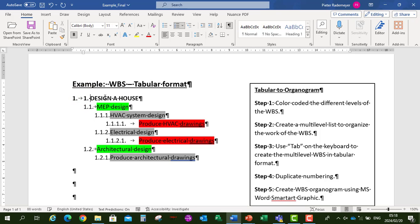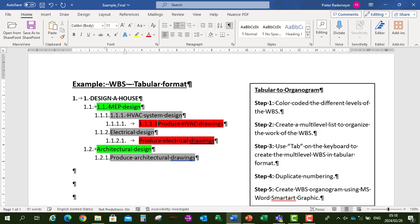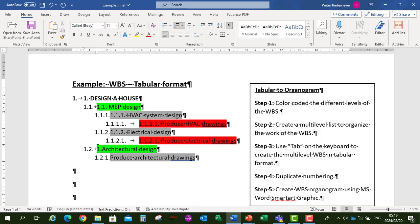Now we need to include our numbering in the tabular format. So that's 1, 1.1, 1.1.1, 1.1.2, 1.2, 1.2.1, and lastly 1.2.1 — applying the appropriate codes to each level of the hierarchy.